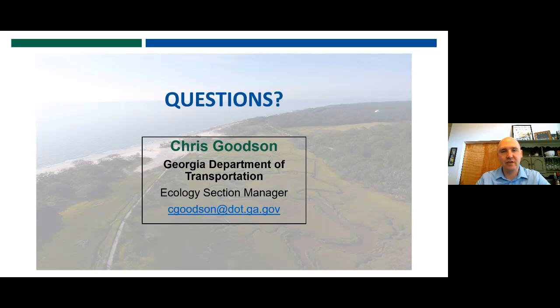If you simply have it run up to your roadway, let's say, and you're going to widen that roadway and you're just going to take a little bit more off of the edge of that high quality wetland, that does not require FWCA coordination. But if you are building, say, a new location roadway and it goes through the middle of a high quality wetland, that's something that our agencies want to have some comments on.